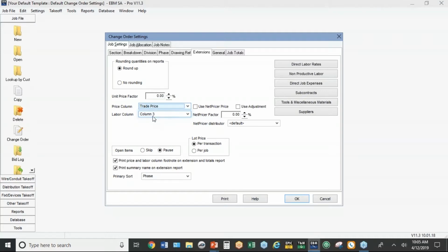On labor, our column 3 is based on the NECA, the National Electrical Contractors Association's labor manual, and what they call standard. You can even go up from that. But for change orders, it's very common to use the NECA labor column for the labor units, the number of hours that you're going to be using in your request for a change order.